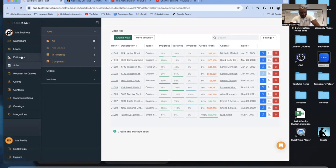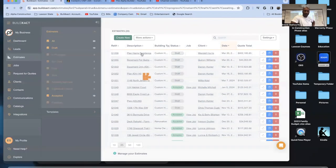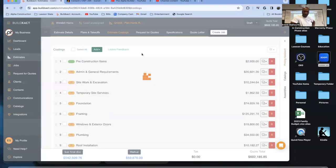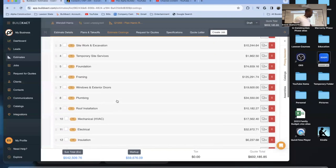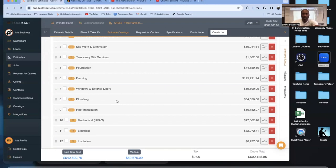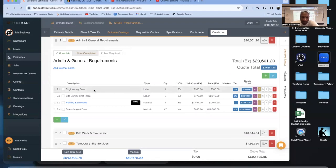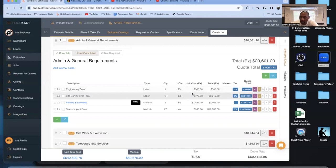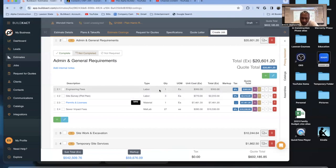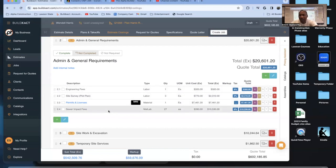Let me look at this job right here. You can see this estimate — I've got all these different categories. Within each category I have line items. So right here I have engineering fees — each engineer costs me about $300 an hour to deal with. I put enough in there for site surveys, permits, sewer impacts, and so on.